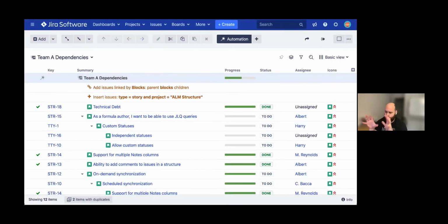And generally speaking, you'll want to do as much of your PI planning live in Jira as you can, because it allows, again, teams to reference other teams' work. You can update blocking dependencies. You can update the status of various things, whether it's, hey, we're going to commit to do this in this sprint, or this is the due date because there are some external constraints. All that information is useful and very pertinent, so it should be accessible.